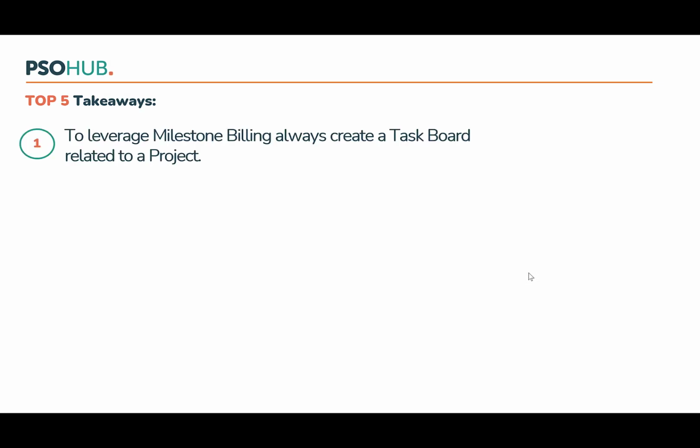There are a couple of takeaways, and we made a top 5. First of all, if you want to leverage milestone billing, you always need to create a task board on the project. So you can create a task board standalone, but you need to create a task board related to a project so we can relate the milestone task to a contract line.